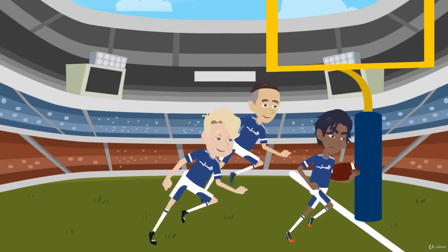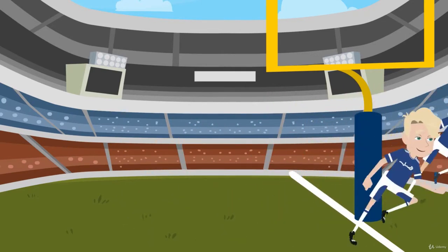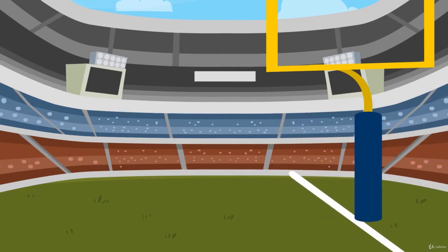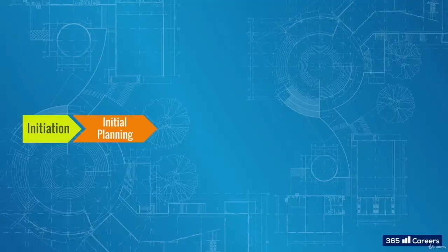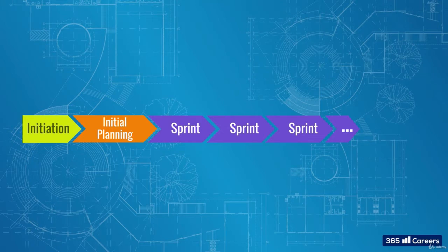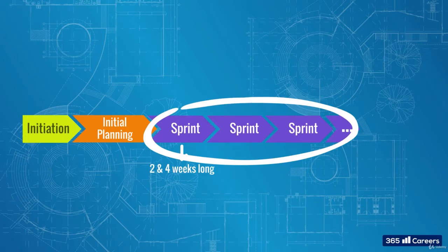As we saw in the introduction, the cross-functional team is running towards the desired destination in short phases. These short phases indicate what we know from Agile as iterations. In Scrum, these phases are called sprints. The sprints represent a fundamental part of a Scrum project lifecycle. Each one is usually between 2 and 4 weeks long and has to deliver a given part of the product. Collectively, all sprints in a project need to deliver the entire product with all desired capabilities.